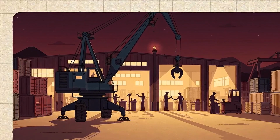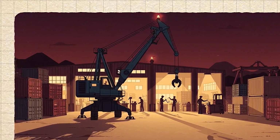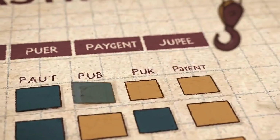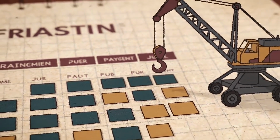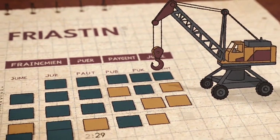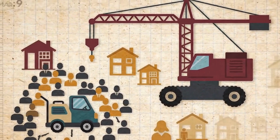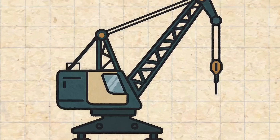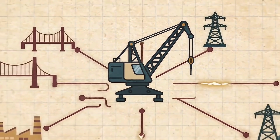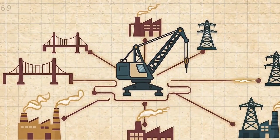The machine that appears to do all the work may require an entire support operation before it can do any work at all. In the Tampa Bridge case, ALL says the LTM 1750 deployment arrived in 18 truckloads. The crew was 10 people. Assembly took about 7 hours once site access began. Those numbers are from one project, not a universal recipe. They matter because they reveal what a crane owner's calendar actually contains.